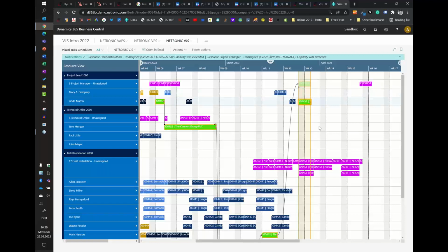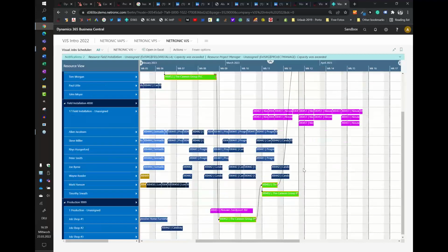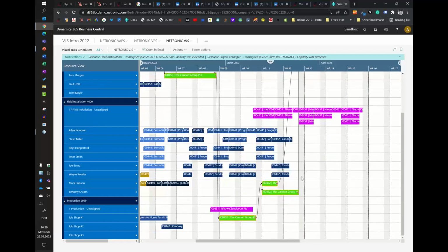So now my customer comes and says, okay, it's actually really cool if you can deliver by the end of week 13, but any chance that you can speed this up? And there is a potential to speed this up here in the installation process. So if this task could be shared between people, if I would have another resource here, or if I could make better use of some resources here, what I would do is say, okay, instead of having one person working on this 2 weeks, we can have 2 persons working on that 1 week.